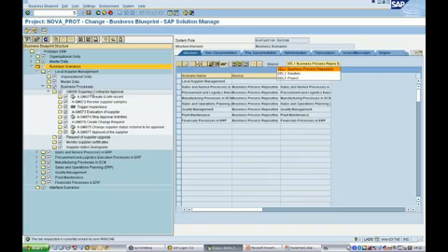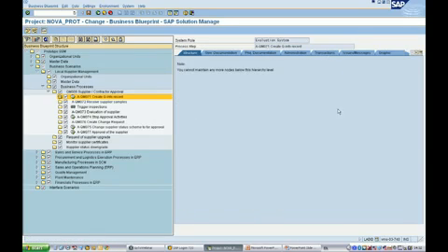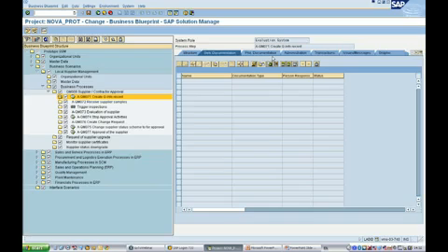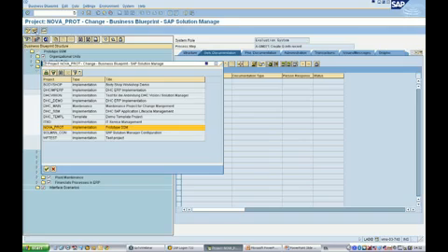In this example, this is from the SAP Business Process Repository, and when you do this, the system will automatically pre-fill specific information from the repository. For example, it will fill in any transaction codes which are defined in the repository, and it will also fill in any general documentation or project documentation which is defined as an accelerator. But I wanted to show you how to make this on your own.